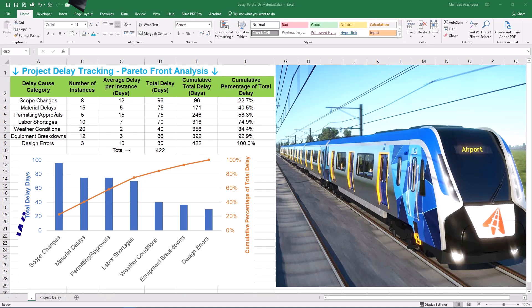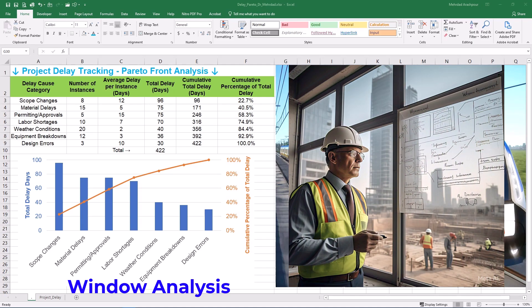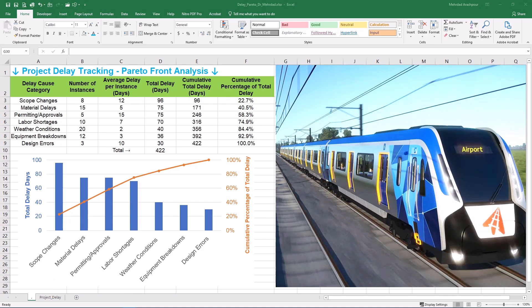Then there is window analysis. This method breaks the project down into periods or windows of time. Within each window you analyze what actually happened and attribute delays to different parties. Window analysis is helpful in handling concurrent delays where both the contractor and owner have contributed to delays in the same period. However, it can become complex and data-intensive, and defining the windows themselves can be subjective and influence the outcome.